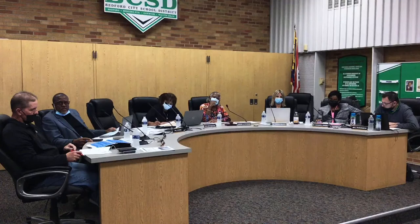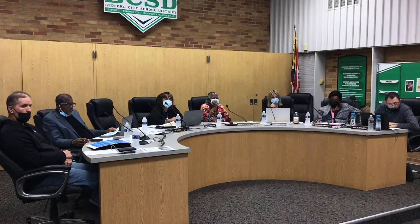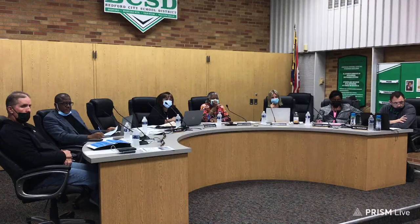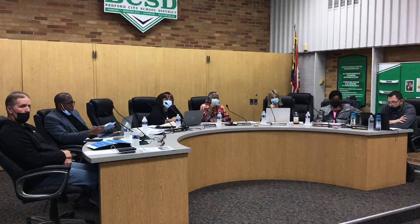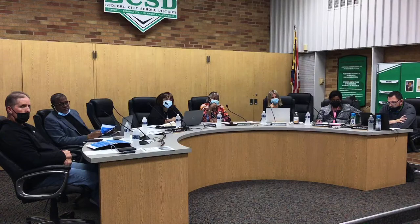Construction and in advance. Wayne's company has done the demolition of the old wood sleepers and what was left of the concrete, and Wayne has prepared the floor. Some of the floor, as I tried to explain last time, was up and down, and some of the higher parts were taken down because the grout was sticking. So he patched the holes that were caused by getting rid of the high spots. So it's all ready for us to hopefully make a decision to move forward so he can finish prepping the floor and we can get the wood floor ordered.